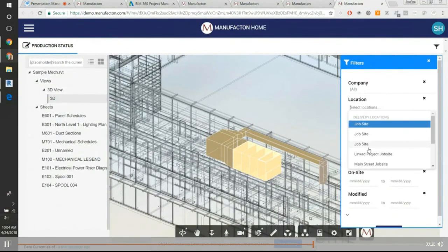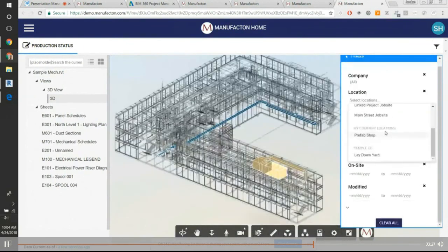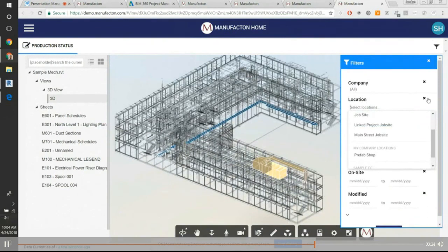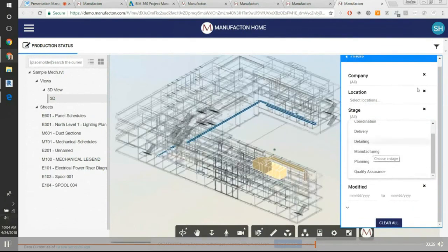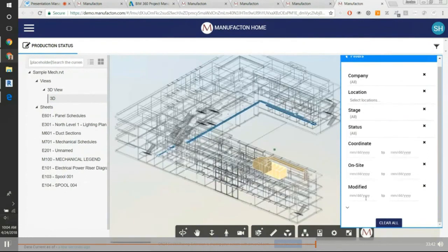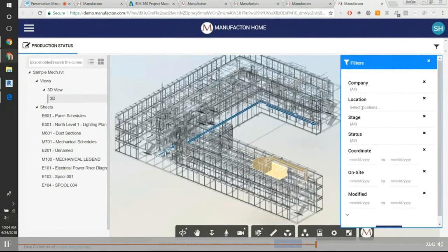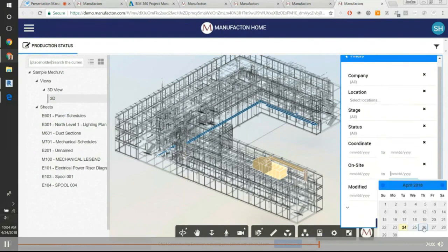And we've really expanded beyond this, and I like to call this piece really the visualization of the material stream. What this allows is any non-Revit or non-BIM user to have instant visualization in a model-based environment in a friendly web-based app, right? And again, this would be hosted through BIM 360 Docs, but exposed through Forge. And what this allows is the field super to really build that 3-week look ahead, right? We can come in and say, show me all material that's being delivered in the next 3 weeks, or show me all material that's sitting in the storage yard currently, and where that relates within the model. So this really gives that next layer of visualization to what's actually happening.